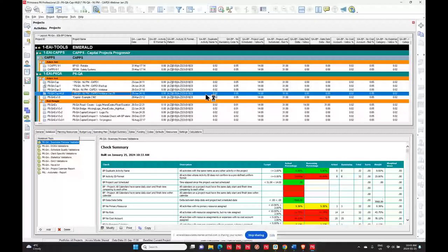Now, I don't know if that's one you've ever tried to review in layouts in P6. It's not easy. So this one is going to give it to you right away. And this is very, very helpful because, just to give you a quick example, I've run into a lot of cases where when you start a turnaround, you're installing scaffolding. And I've run reports, and you probably think, no, it can't be that bad. Yeah, I've run reports that were 40 pages long with all of the activities that said install scaffolding. When that goes out to the field, that's a big headache for them.